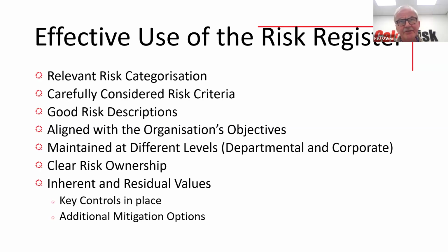The criteria tend to reflect, or should reflect, the objectives, looking at basically what's lost and the extent to which the consequence and the likelihood might occur, and when it begins to become an issue in terms of the calculation of the residual risk. And the mathematics of that is done just to put the risks in a context. So what are the things you should be worried about, and what are the things that are not of immediate concern? And that turns up in the sorting of the residual value in the risk register.